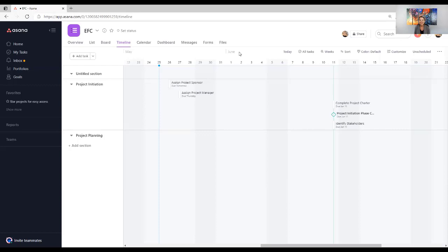In order to do that, this is the shortcut, or in my opinion, a shortcut at how to define those dependencies. If you hover over the task that you would like to link to another task, then you're going to see that there is a blue line with a ball that pops up at the top, a blue line with a ball that comes down to the bottom.